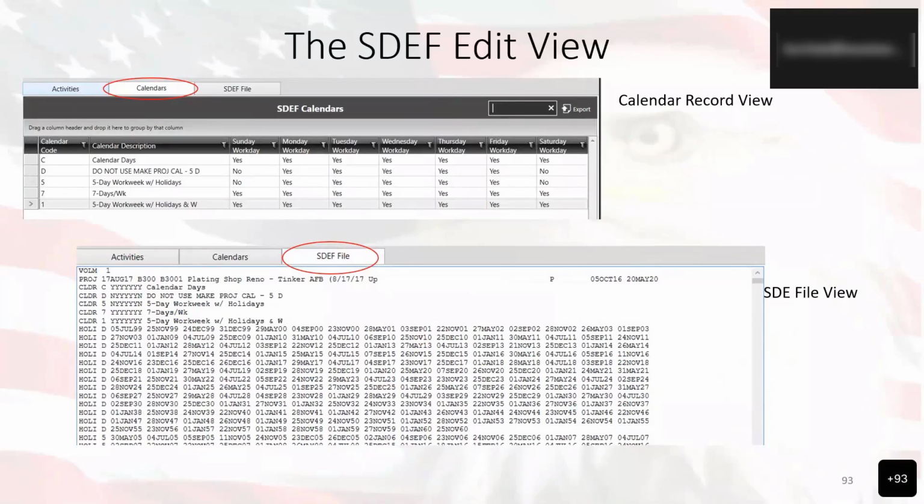The NAS SDEF activity schedule is used to keep track of the actual and scheduled start-finish dates of contract activities and used to process pay requests. Review of contractor schedule will continue to be outside of RMS 3 government mode using contractor schedule software. Activity schedule can be entered manually or by the SDEF import. That's an option that they can choose.